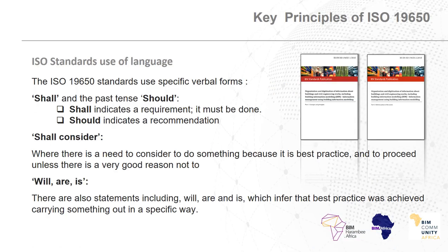The ISO standards are very specific in both their terms and their requirements. For example, if a clause includes "shall", then the clause must be followed. On the other hand, if it includes "should", then following the clause is a recommendation. Similarly, if the clause includes "shall consider", the clause should be followed as best practice unless there is a good